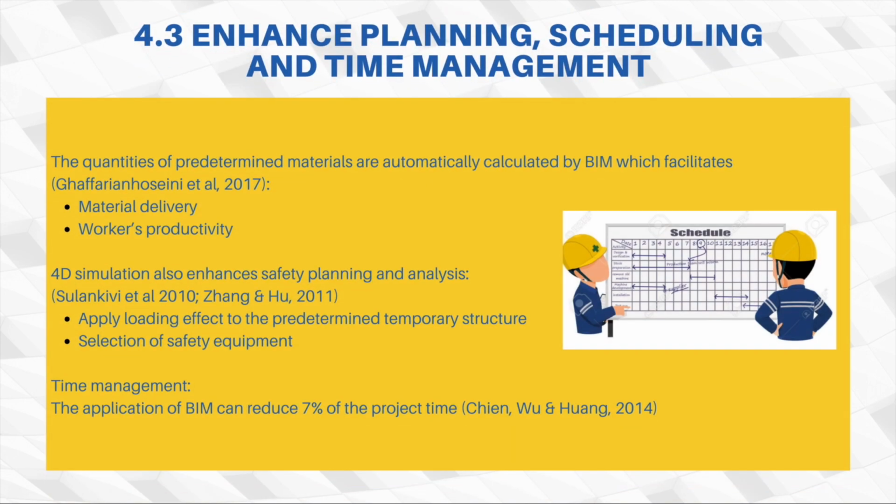BIM is also beneficial to planning, scheduling, and time management because the quantities of the works are automatically calculated. This will facilitate the material delivery and workers' productivity so that the project manager finds it easier to plan the schedule. Also, 4D simulation enhances the safety analysis for planning the temporary structure and the selection of the safety equipment. For the time management, scholars estimate that the application of BIM can reduce the project time by 7%.